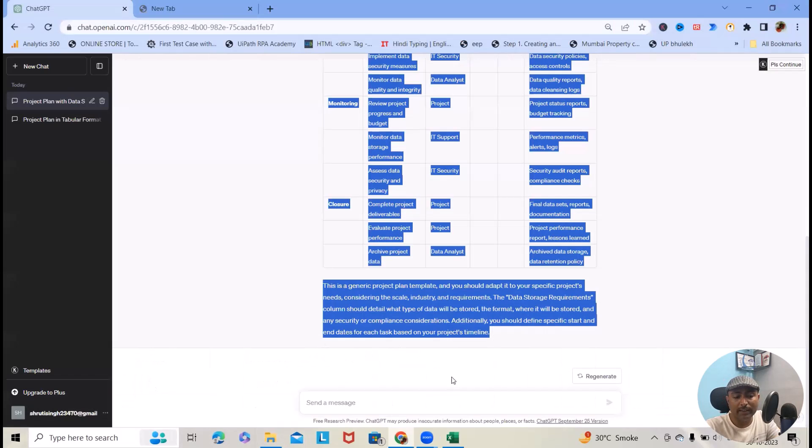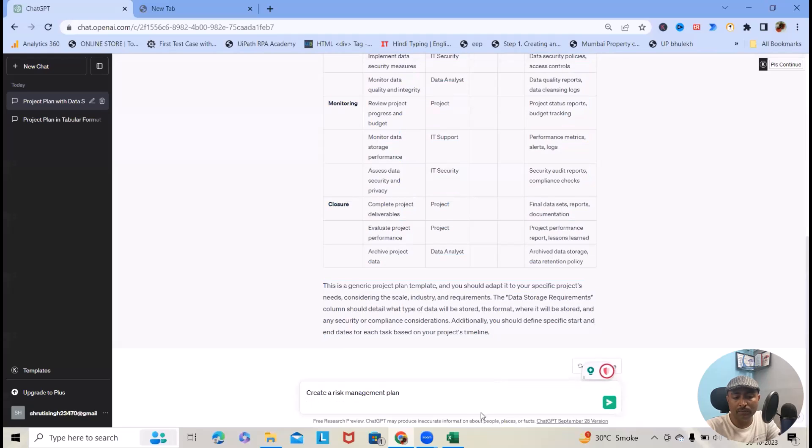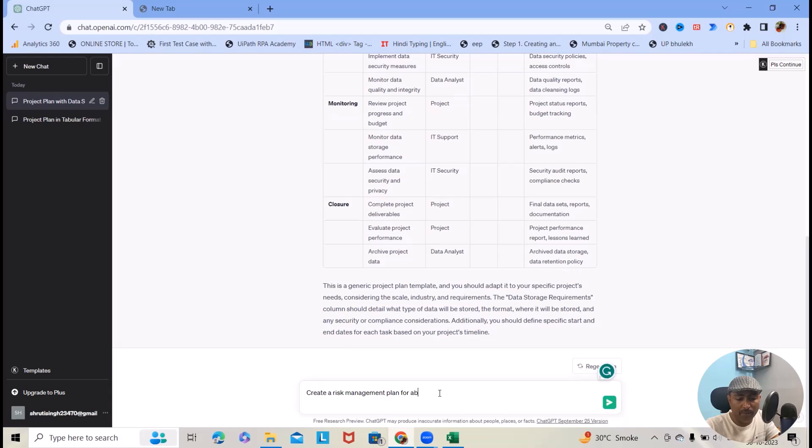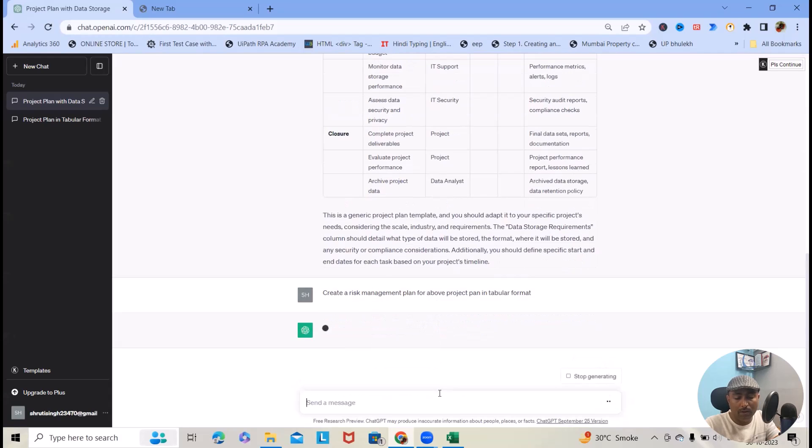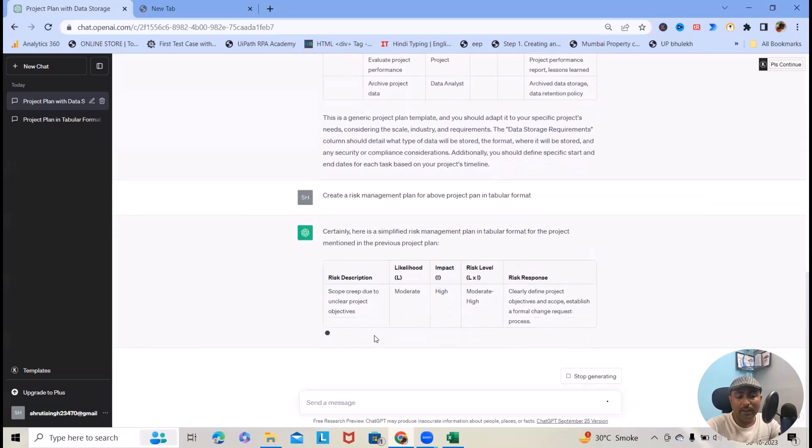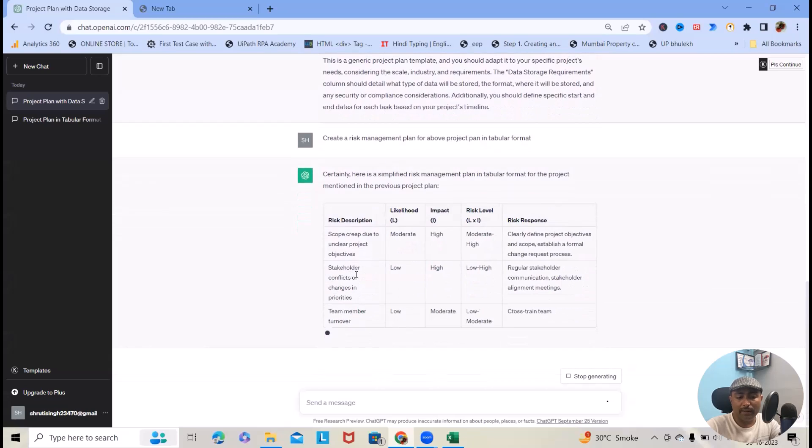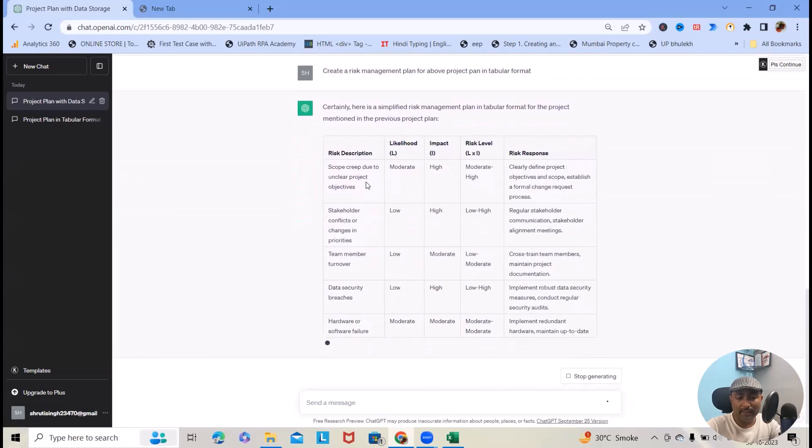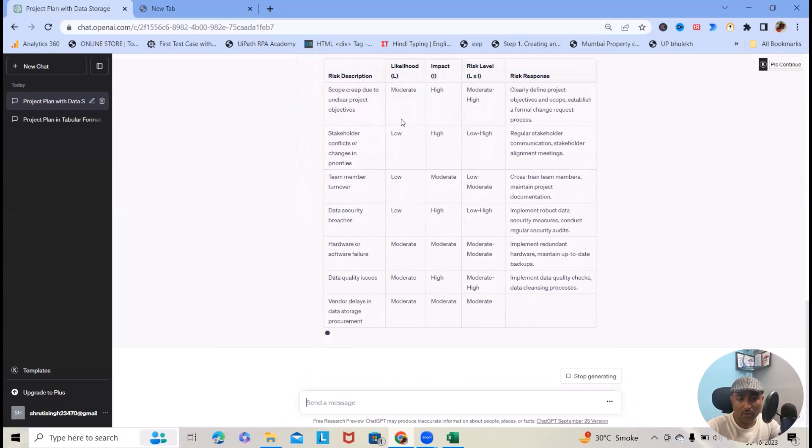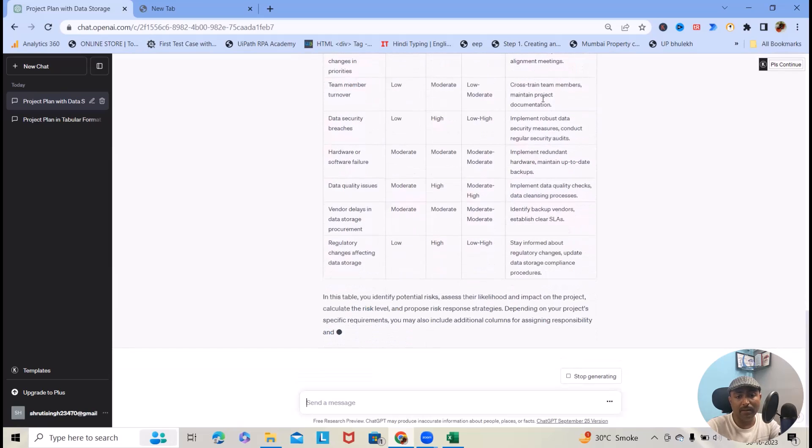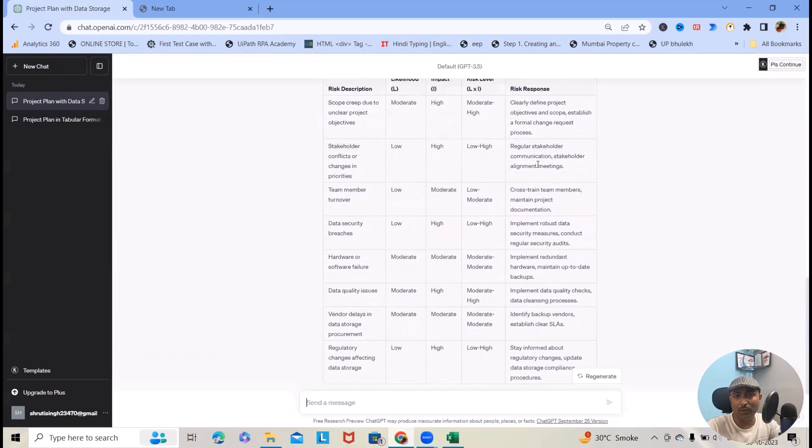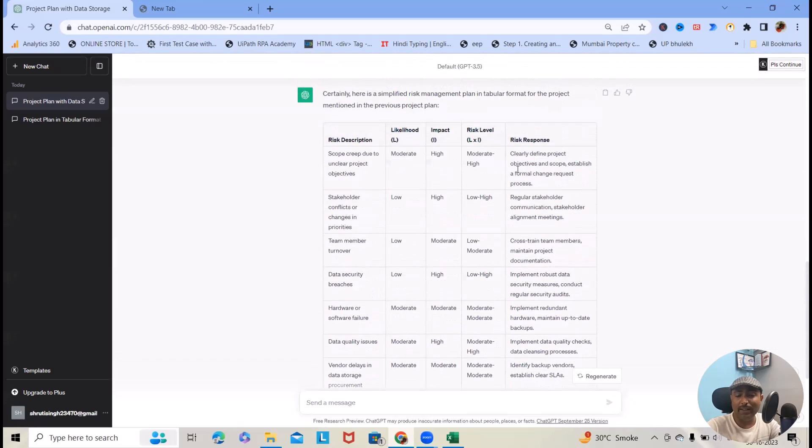Let's consider I want to generate this. Create a risk management plan for above project plan in tabular format. Now, this will give me detailed risk descriptions like likelihood, impact, risk label, and risk response. At least I got an idea. These informations will be needed. I will be able to modify depending on the project's requirement.